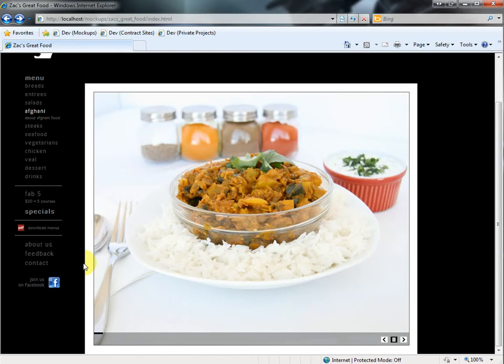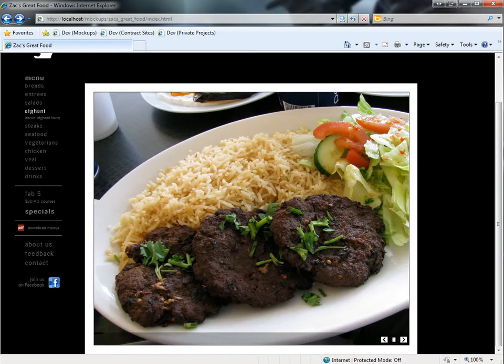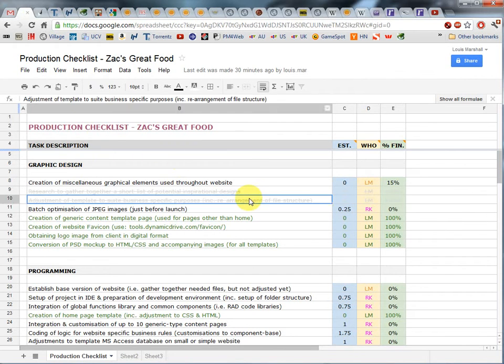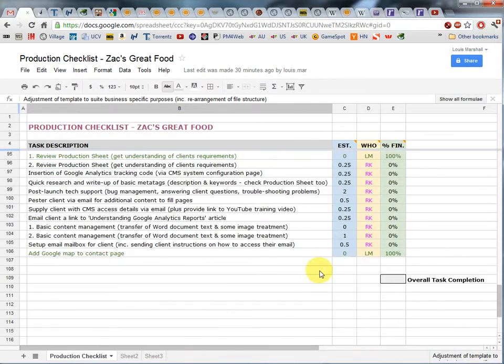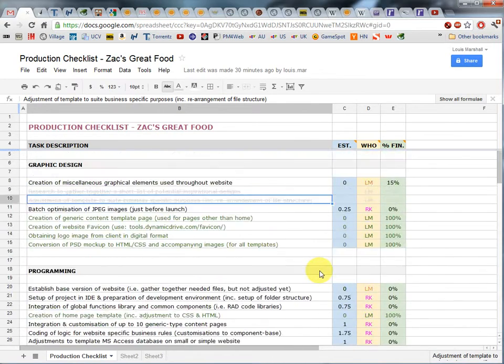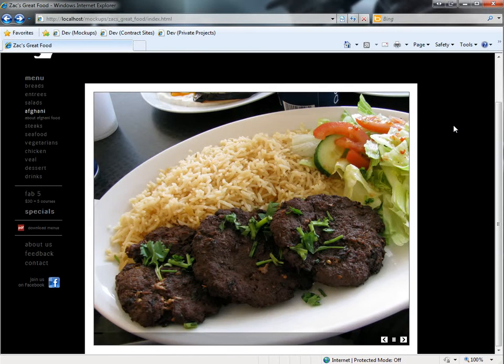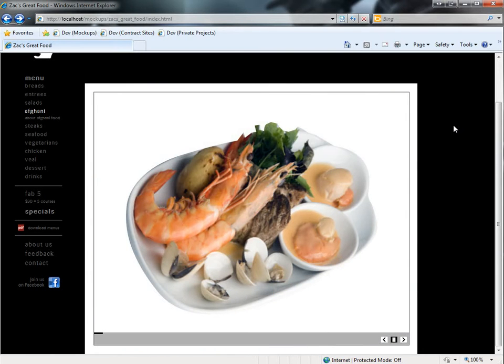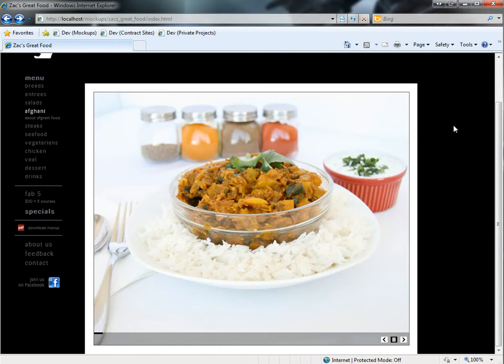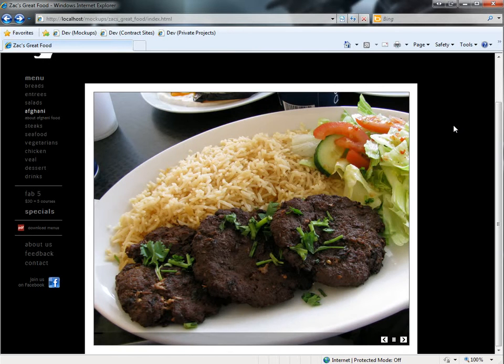and that's going to take an hour plus, that's the sort of thing where you would check the production checklist here, and you would look through and go, "Well, I don't know about that. Is there an allocation of time for that feature? I better check." If it's not there, then you would ask me. You would say, "Ray's asked for something which I can't find any approval for. I didn't see it in the tech briefing video. I can't see it in the production sheet or the production checklist. What should I do?" So that's me acting in my role as project manager, because I'll have more knowledge about the financial side of things. So you would hand that over to me.